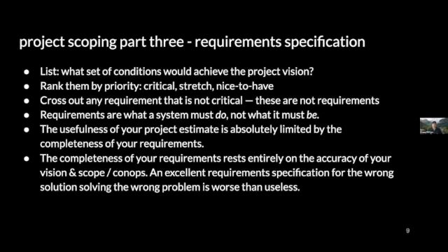By definition, anything that is not critical to meeting your vision and scope is not a requirement. And if it's not verifiable, that is, you can't say for sure that the specific requirement has been achieved, it's not a requirement. So this is a verifiable list of conditions that enable you to meet your vision and scope.